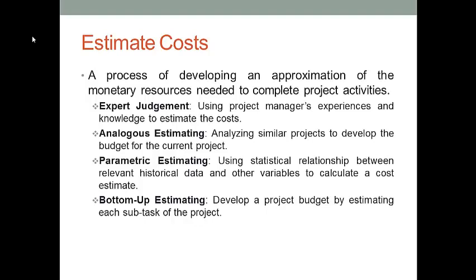The next method is called a bottom-up estimation. When you use this method, you want to estimate the cost for each specific activity within your project. And then you want to add each estimation together. The total will be the estimated cost for your entire project.